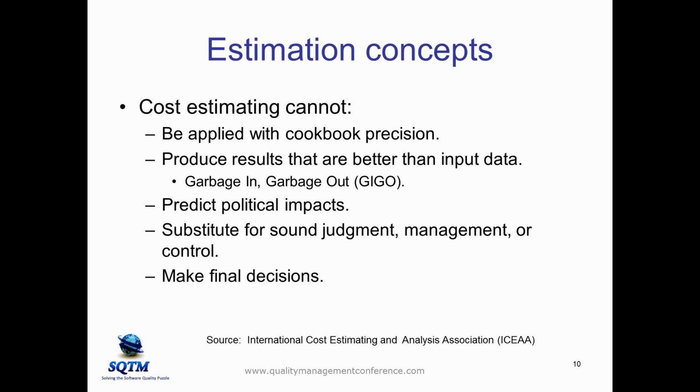Now, we can't say, well, we don't have good requirements, so we can't do anything. What you can say is, if the business doesn't understand what they want, then we can't do a good estimate. If the business knows what they want, but the requirements aren't clear yet, then we can be part of that process of clarifying those requirements. However, if the business doesn't know what they want, then it really is not ready to estimate at all.